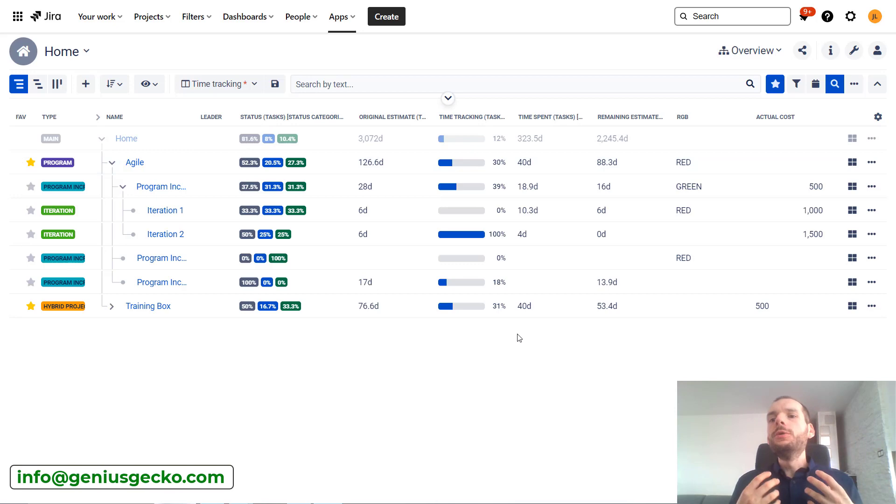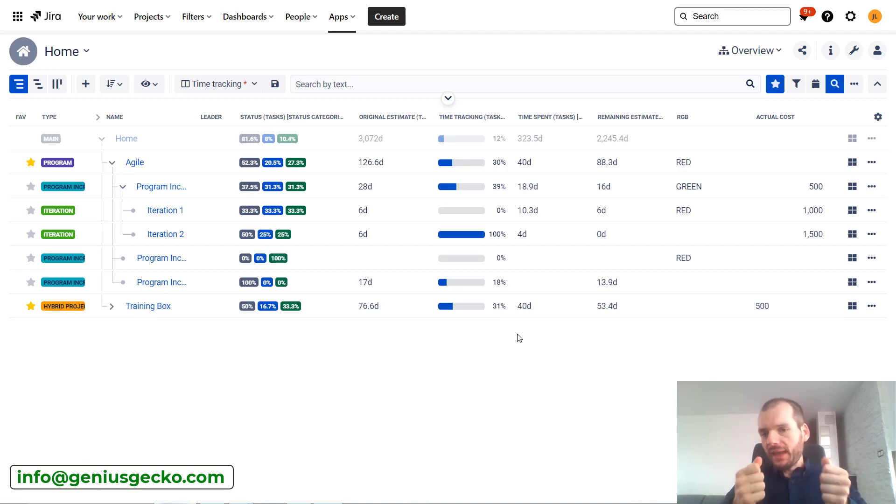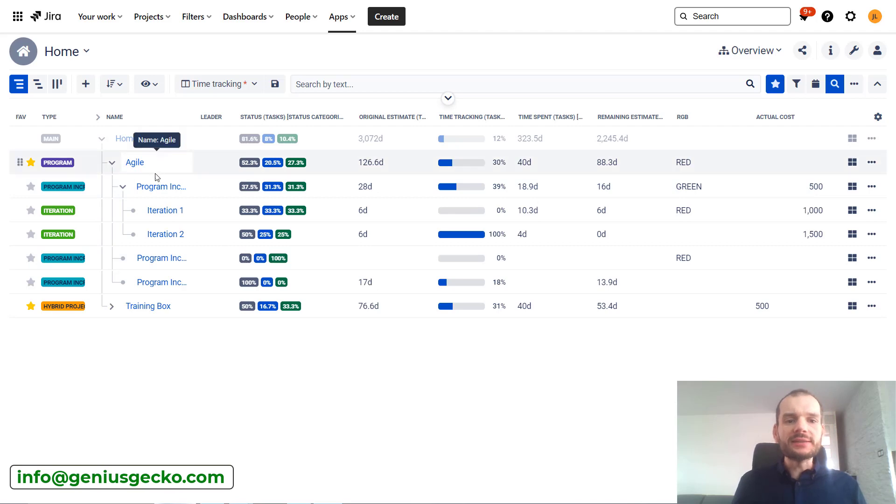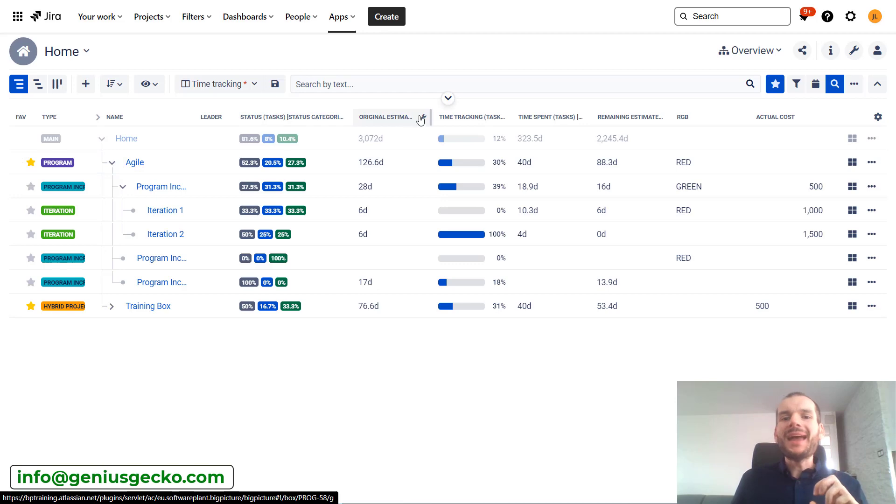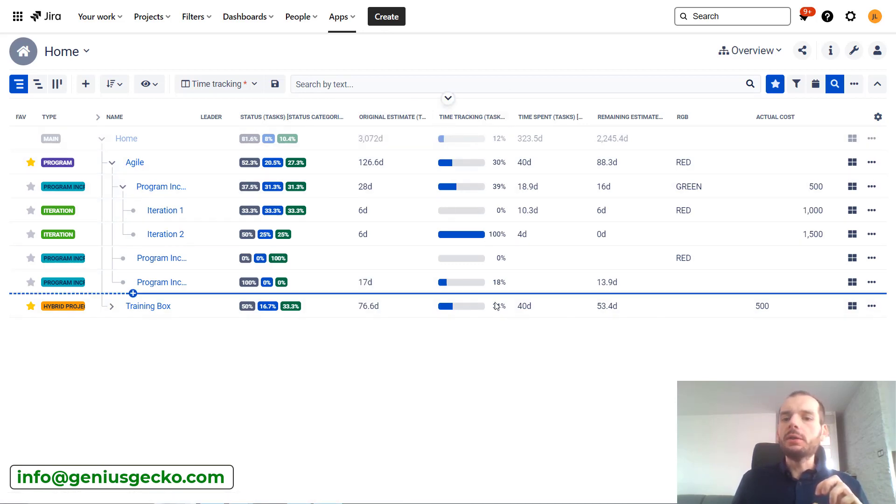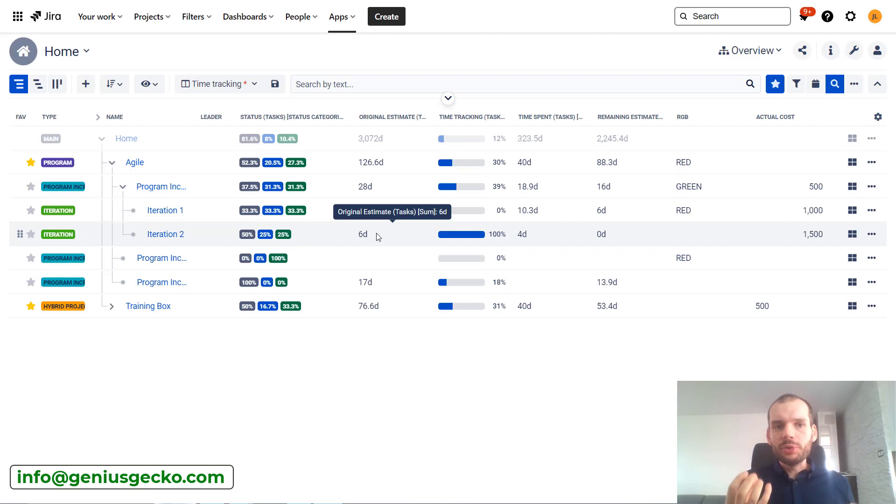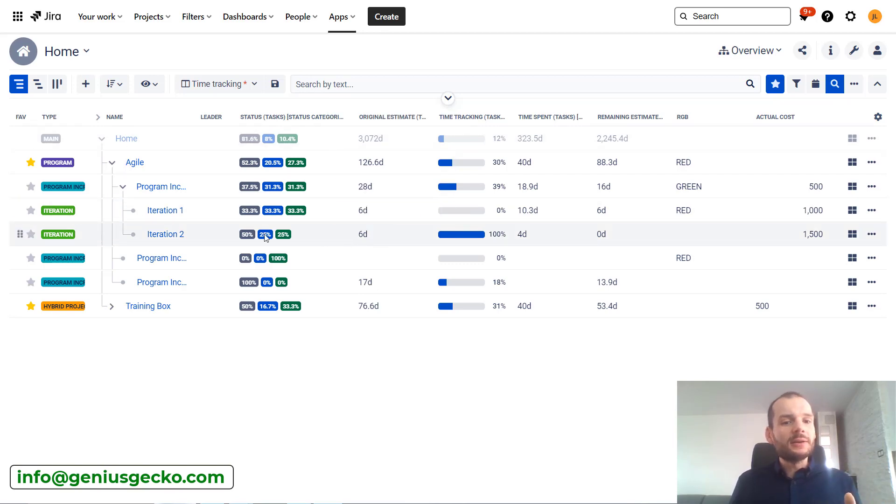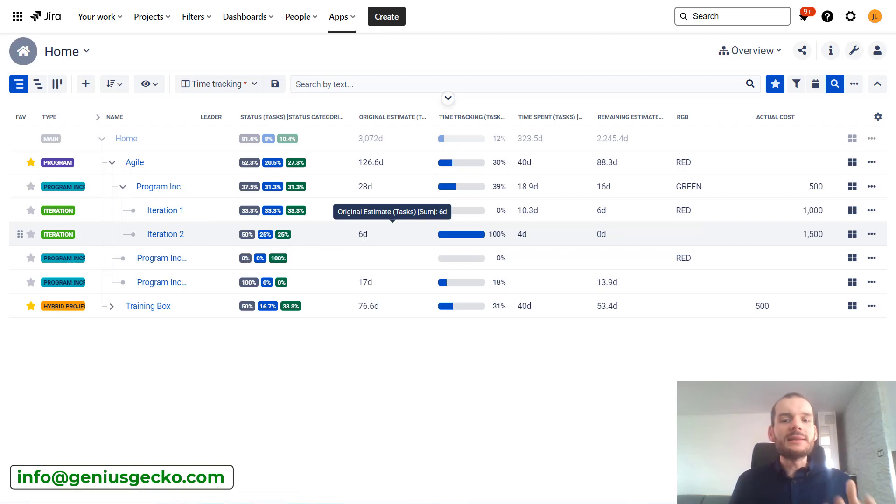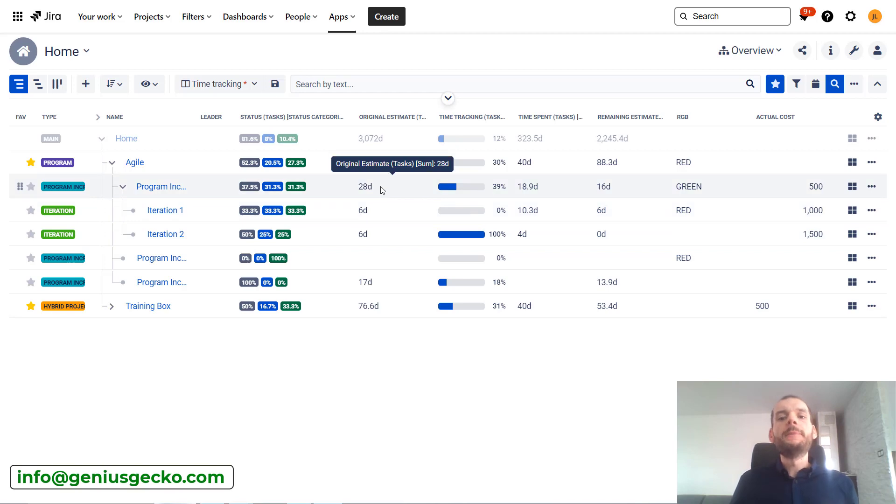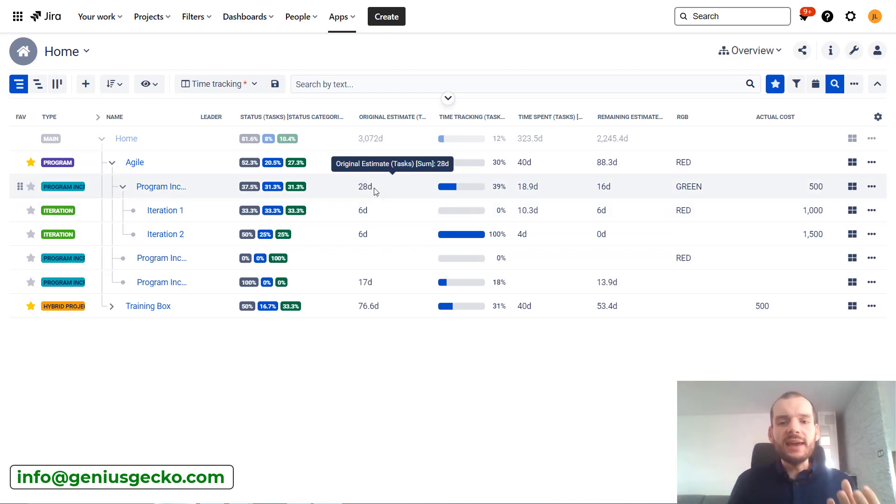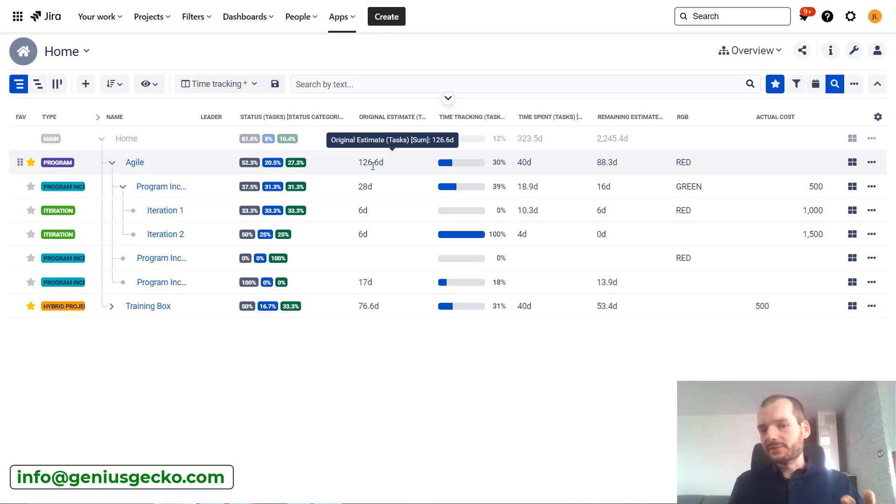The overview module allows us to pull information out from the box and see its overview over here. You can see that I have two iterations within a program increment within an agile project. These columns actually display aggregated information taken from the tasks that are within the box. I have a column for original estimate, and it tells me that in iteration two there are tasks estimated in total for six days. The same goes for iteration one. On the program increment level this is already 28 days, and for the whole project this is 126 days.